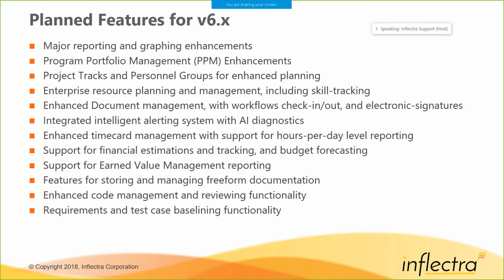so that if the project dates start to slip, it will impact the overall program milestone. And being able to basically do multi-level programming and get a Gantt chart view of the program. That will let you roll up multiple projects together and do dependency tracking. So those kinds of high-level planning are a key part of what we're going to be adding in version 6 and beyond.